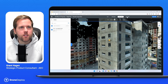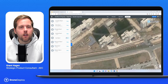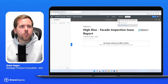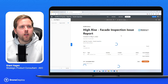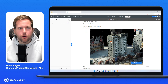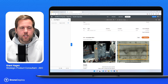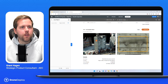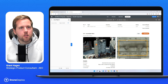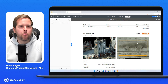Now we're going to jump over into the report tab. This is where we start to turn everything into actual information for the folks who may go and inspect this visually or from actual equipment to go and correct it. I'm going to click on issue report and change my issue type to 'high rise complete.' This is where the reporting comes in really handy — you can see where that issue is, it created a number for it in context of where it is on the building, it gave the zoomed-in view of what that issue was, and it kept all the information: the type, the severity, when it was created, the status. This is the best part of this whole process — giving us full context into the workflow from flying to uploading to exploring to reporting.